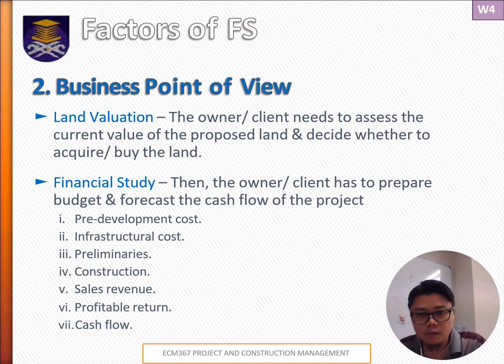Alright, and following this is a thorough financial study whereby the client must draft a budget and forecast for the project's cash flow. And this could include the likes of pre-development expenses, infrastructure costs, preliminary outlays, the construction itself, and anticipated sales revenue.